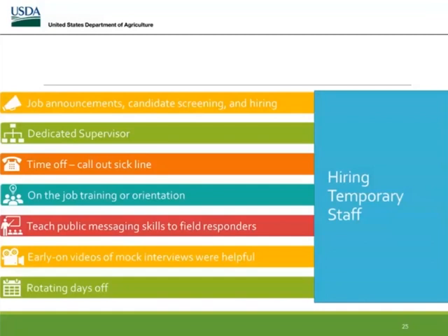And when you're out in the field, you are going to interface with the public, and we really needed to teach public messaging skills. A lot of times the conversations they're having with individuals are difficult conversations sometimes. And so we had some personnel from VS early on in the public information area who helped us create mock interviews and record those interviews, and we were able to use those video recordings of mock interviews to help teach those public messaging skills to our temporary staff, and that worked really well.